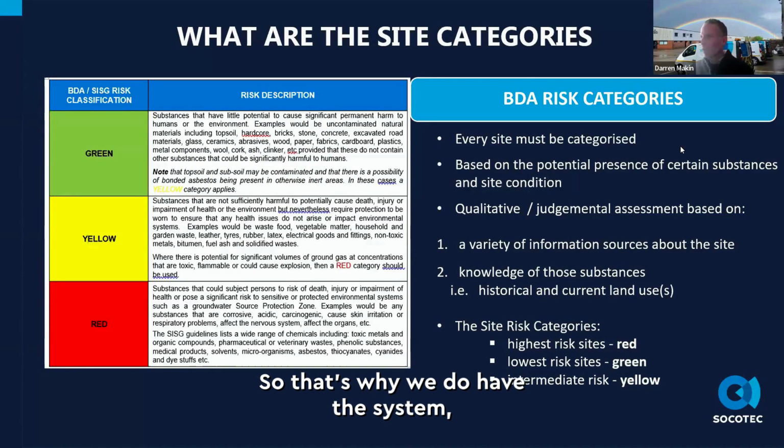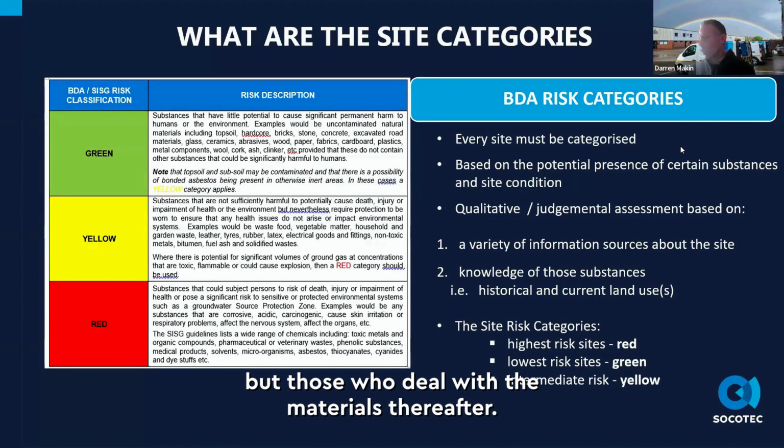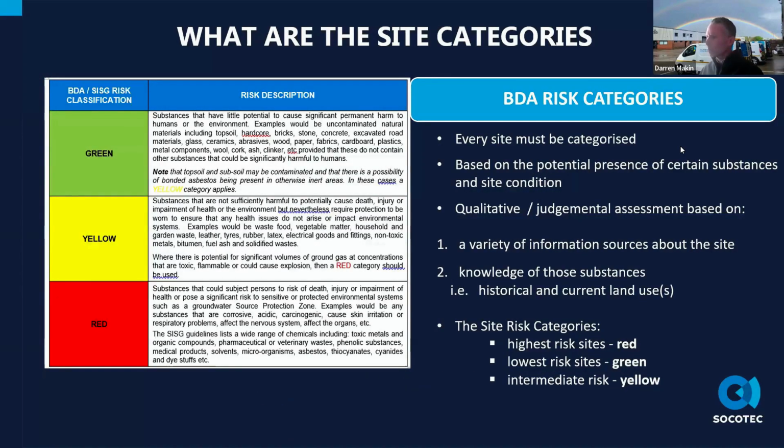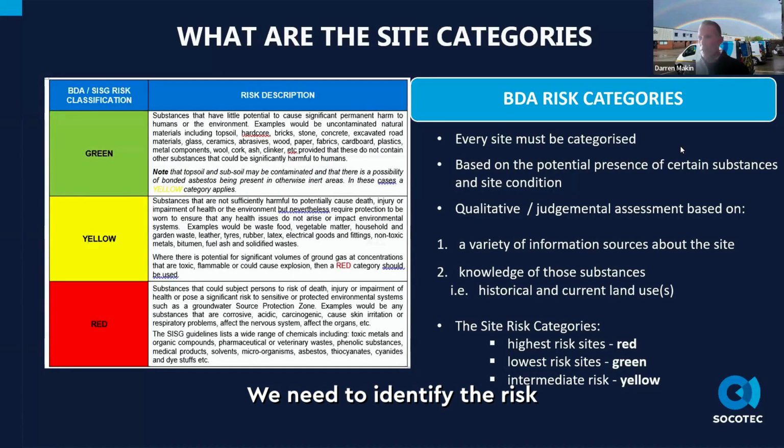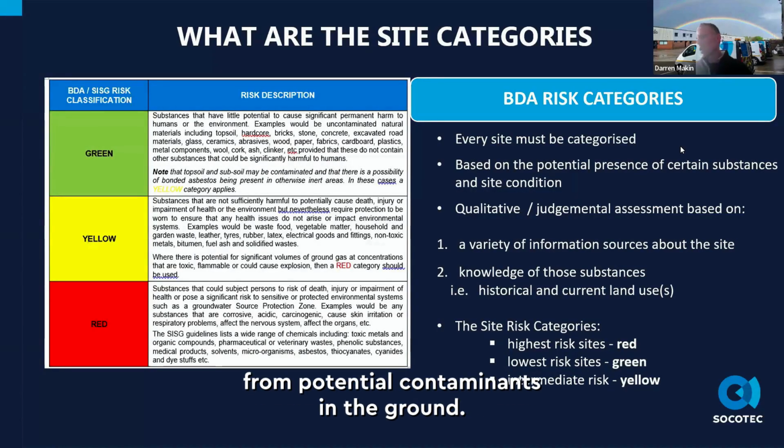So that's why we do have the system, not just for the workforce, but for those dealing with materials thereafter. So every site must be categorised in ground investigation. We need to identify the risk from potential contaminants in the ground, and these are based on these definitions.